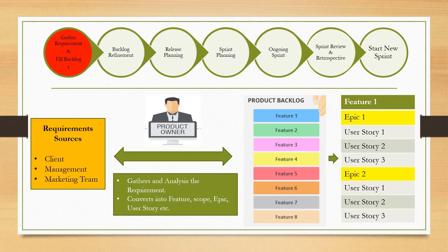Hello friends, if you want to know the Scrum process in software development then you are watching the right video. The first phase is requirement gathering and filling the backlog. The product owner gathers requirements from requirement sources — which could be a client, a management team, or a marketing team — and then converts those requirements into understandable formats like features, scope, epics, and user stories, and fills them in the backlog.